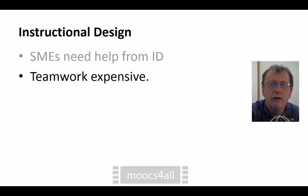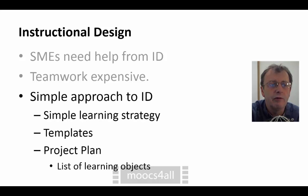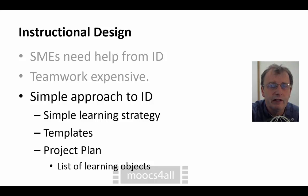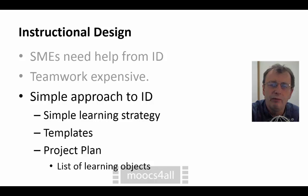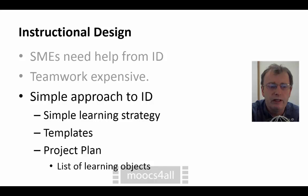Bear in mind that the idea of teamwork is expensive. We want to minimize the amount of communication overheads and possibly unnecessary work involvement, because it makes the process expensive. So we would probably take a relatively simple approach to instructional design. We'll use fairly simple but effective learning strategies, nothing too sophisticated. We'd probably use templates for documenting those strategies and come up with a simple project plan consisting of a list of learning objects to be developed before particular points in time.